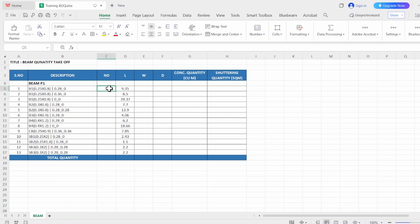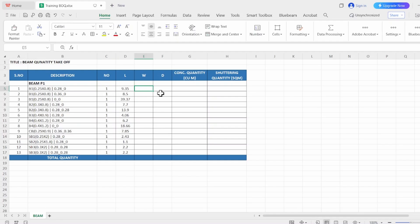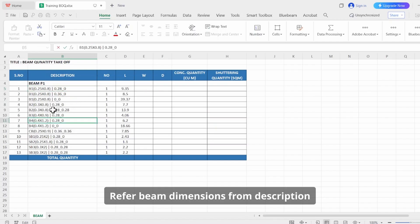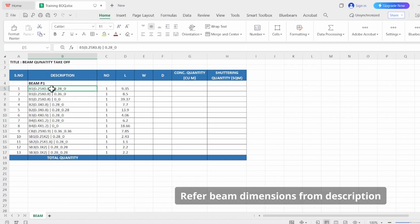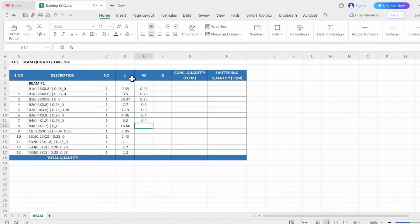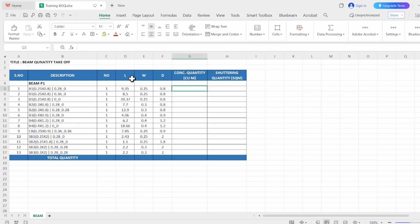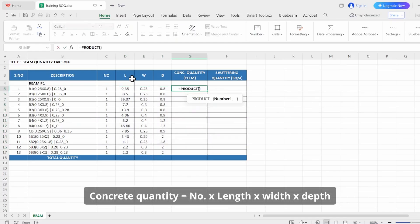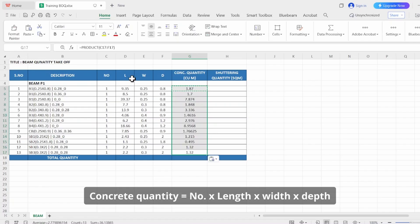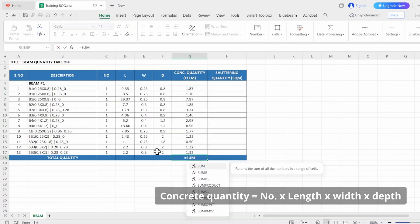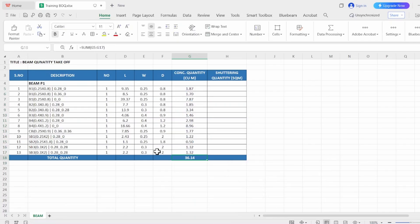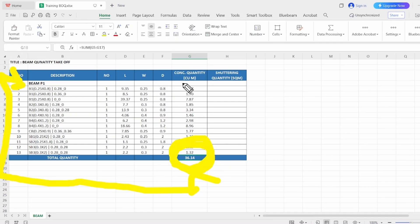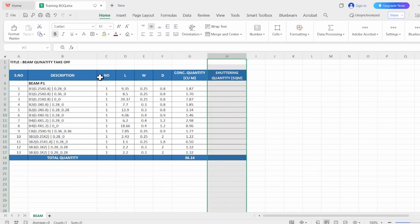Now we're going to work on this to derive our quantity. First is the number—we have number just one. Yes, so width and depth we can take it from here. Our parameters are ready. Now just multiply everything to get quantity. So this is our concrete quantity.